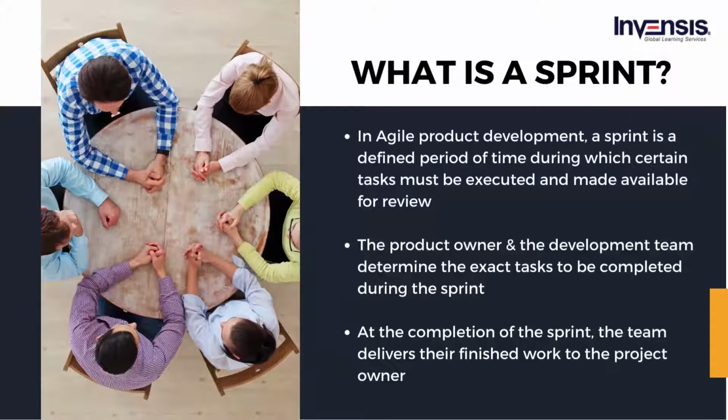The development team has the final word on the amount of work that can be realistically completed within the sprint, while the product owner has the final say regarding the criteria that must be satisfied for the work to be accepted. The sprint time is chosen by the Scrum Master, the team's facilitator and Scrum Framework manager. Once the team gets an agreement on the duration of a sprint, all subsequent sprints should be identical. A sprint typically lasts 30 days.